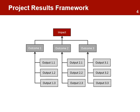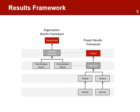For example, to fully achieve outcome 3, all 3 outputs must be delivered. A results framework can include global goals, region or country goals, and the sector or program goals that the project will contribute to achieve. Each level of results will have its own predefined results indicators.